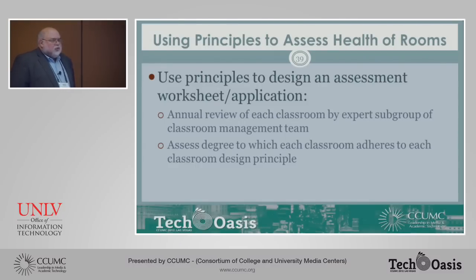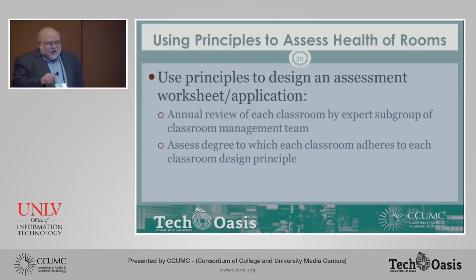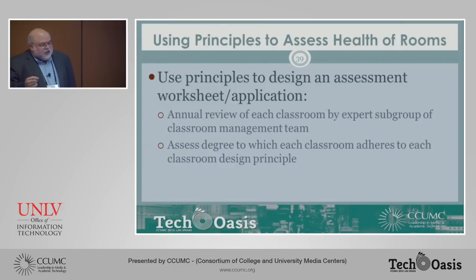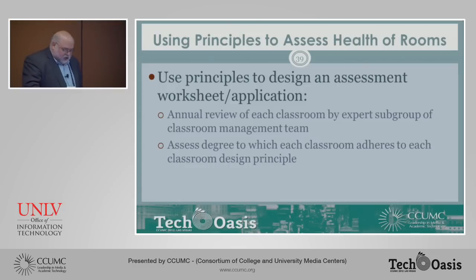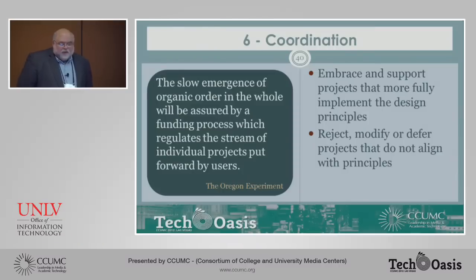There were 402 classrooms total, and 302 were represented on the survey — again a summer survey so not everyone responded. Our next step is to translate the principles into a rating sheet that members of the committee can use to visit each classroom, taking about 15 minutes per room, and use that rating against the principles to determine which are the healthiest and which classrooms are in need of help.